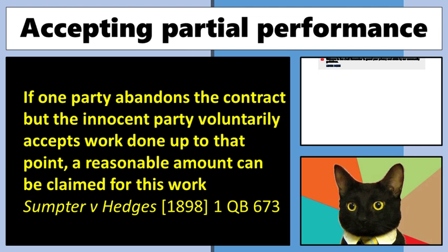If you know those rules and say, oh look, they've supplied us with these products, they're a little bit faulty, we need to spend some money to fix that fault, we're going to pay you this amount. That's fine. You don't have to go near the court. The other side might want to take you to court. They're probably going to lose, but that's up to them. You guys can sidestep the court system entirely, provided you're reasonable in it.